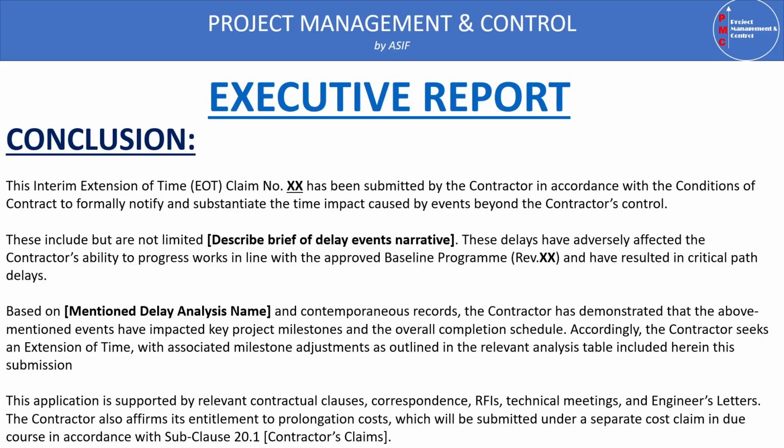Then we have to mention that these delays have adversely affected the contractor's ability to progress work in line with the approved baseline program, revision 0 or revision 1, whatever you are using, and have resulted in critical path delays. Then we mention that based on delay analysis and contemporaneous records, the contractor has demonstrated that the above-mentioned events have impacted the key project milestones and overall project completion.